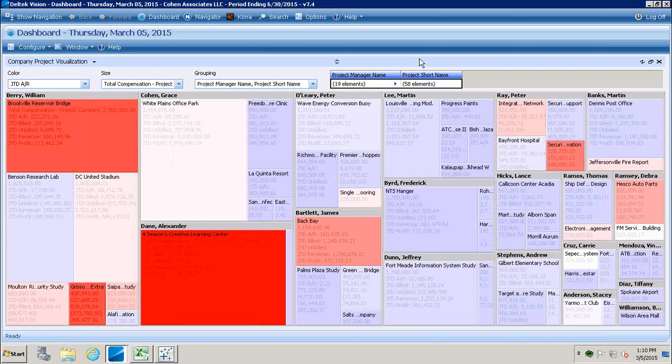We can compare our plan numbers to our actuals and be able to identify any risks. The white again, those are averages. It's very close to the middle. There's not a lot of variance between our planned and our actual, so those are going on just as they should. We should just follow up to make sure the work's getting done, but according to our plan versus actual hours, cost, or bill, they're exactly where we need them to be.